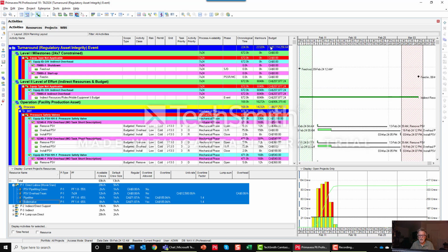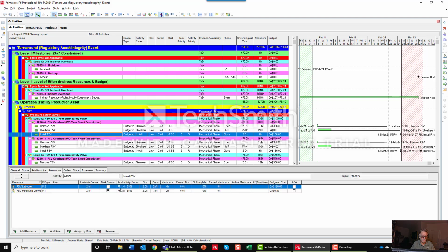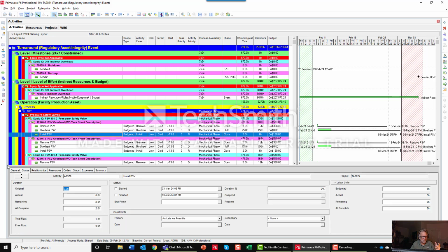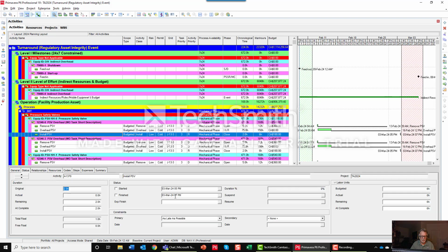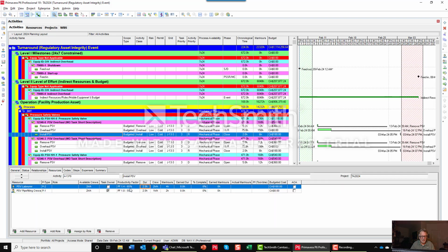So you'll see here, I have a $1 million budget, I have 22,000 man hours, and I have 224 hours of chronological time. Okay, chronological time versus the time that we talked about in the last video. I believe I showed you that the time associated with an activity, duration with this resource, duration times units per time equals my man hours. This is my true duration here, 2-hour duration.